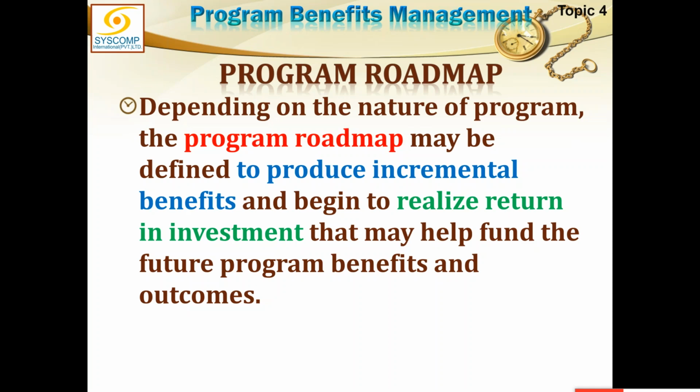So basically, a program roadmap will also be doing almost the same. It will tell you what all benefits will be yielded at what point, what are the major milestones, and generally the gap between two points in time. It is also a general outlay. We can have an idea about when those things will occur, but this is not as detailed as a schedule itself.